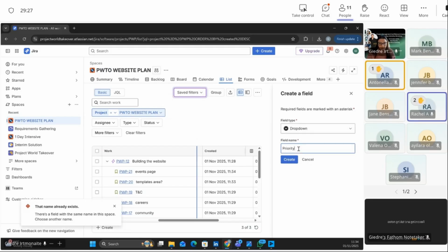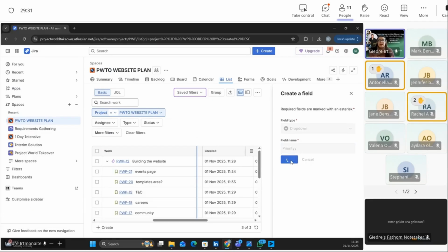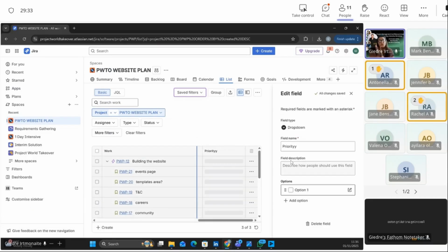I think what we should be doing is having some high-level waterfall milestones that we want to hit, but working in sprints. That's why I even chose the sprint board for this. So we take a board and say, for this week, let's focus on this area and this story, to achieve it.